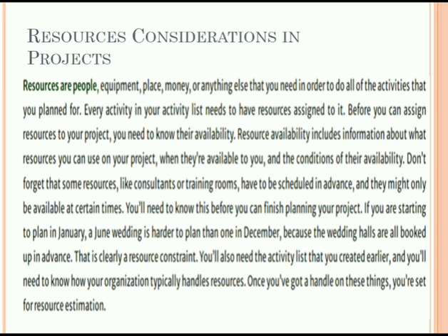The next thing you can consider is bottom up estimating. In this, it means breaking down complex activities into pieces and working out the resource assignment for every piece. As we have seen before, whatever the project, we are breaking the project into a number of steps. Like that, here in bottom up estimating we have to make different pieces of complex activities, not each and every activity. If the activities are easy, you can easily perform those steps.